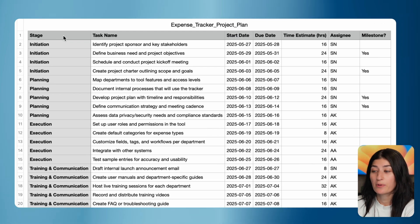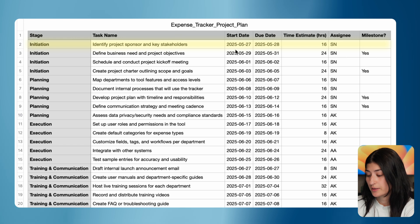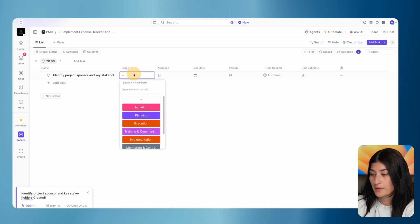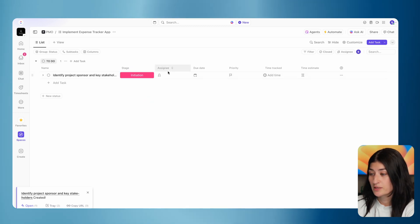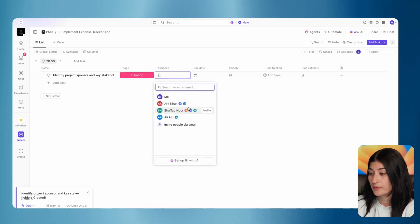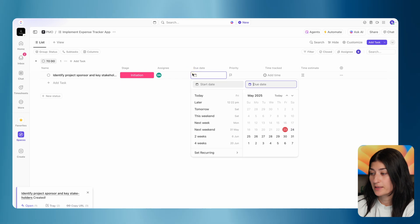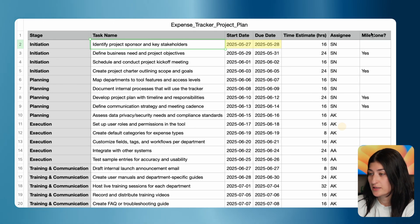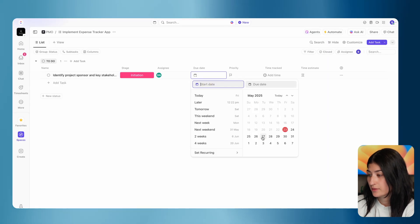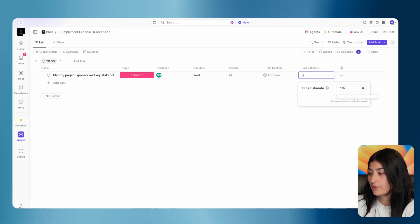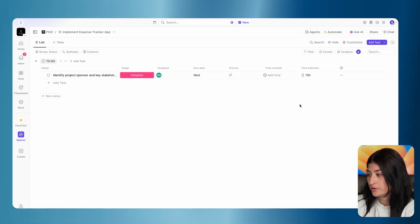For initiation, I need to identify my project sponsor and key stakeholders. Let me go ahead and get that task created. I'm going to add the task name, put the stage as initiation, assign this to me — I'm the project manager — and then put the dates. Let's say we start this project next week and have this from May 27th to May 28th. And I'm estimating for this to take about 10 hours. So I've created my first task.